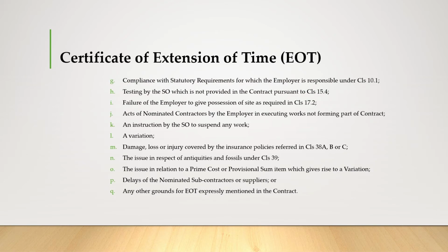Also compliance with statutory requirements for which the employer is responsible under clause 10.1, and testing by the SO which is not provided in the contract pursuant to clause 15.4, and also the failure of the employer to give possession of sites as required in clause 17.2, and the acts of contractors nominated by the employer in executing works not forming part of the contract, and also an instruction by the SO to suspend any work, and also variation,